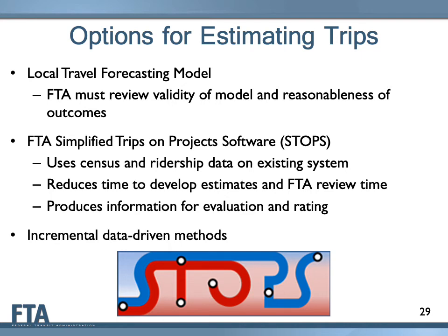The chosen forecasting method should be discussed with FTA well before the submittal of information by the project sponsor for project evaluation and rating. If a sponsor chooses to use its local travel forecasting model, FTA will need time to review the validity of the model and the reasonableness of the outcomes. This can be an iterative process. If a sponsor chooses to use STOPS, FTA's review time is usually much less.